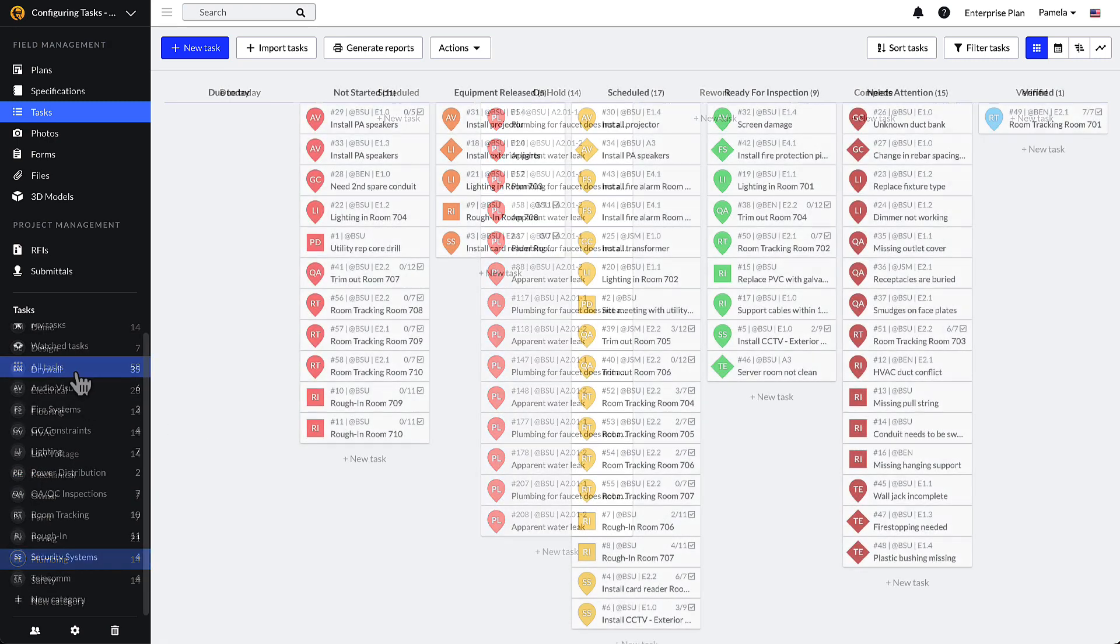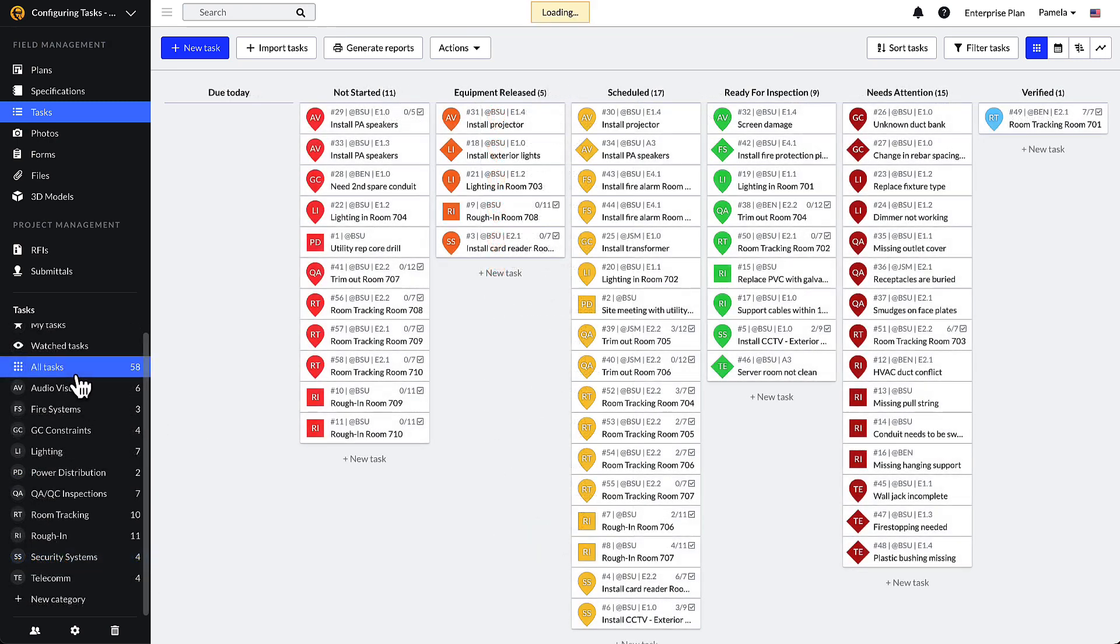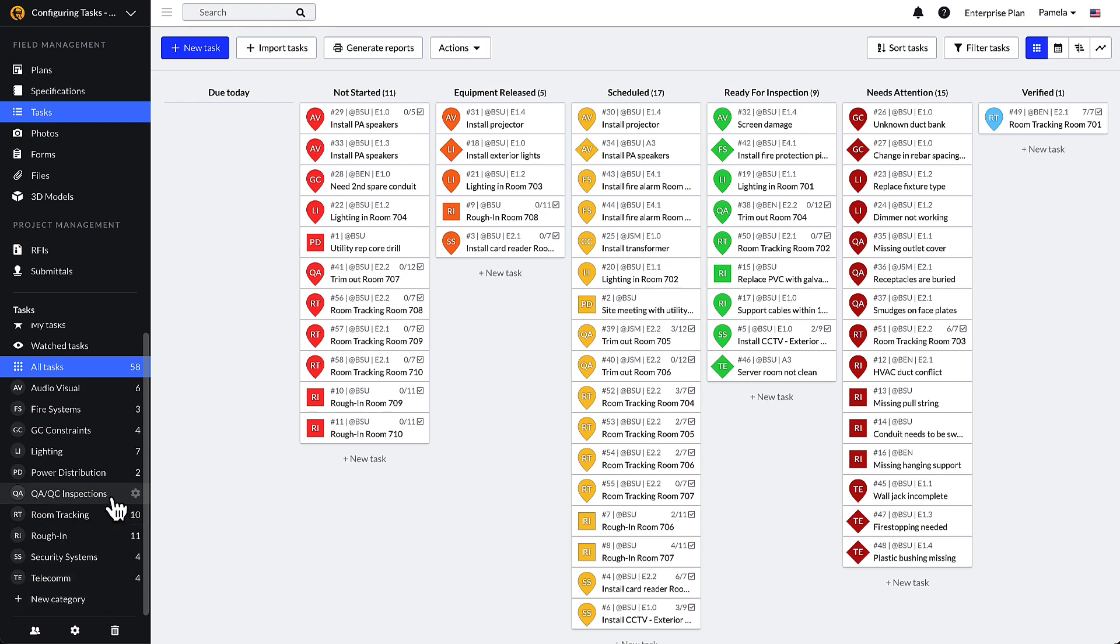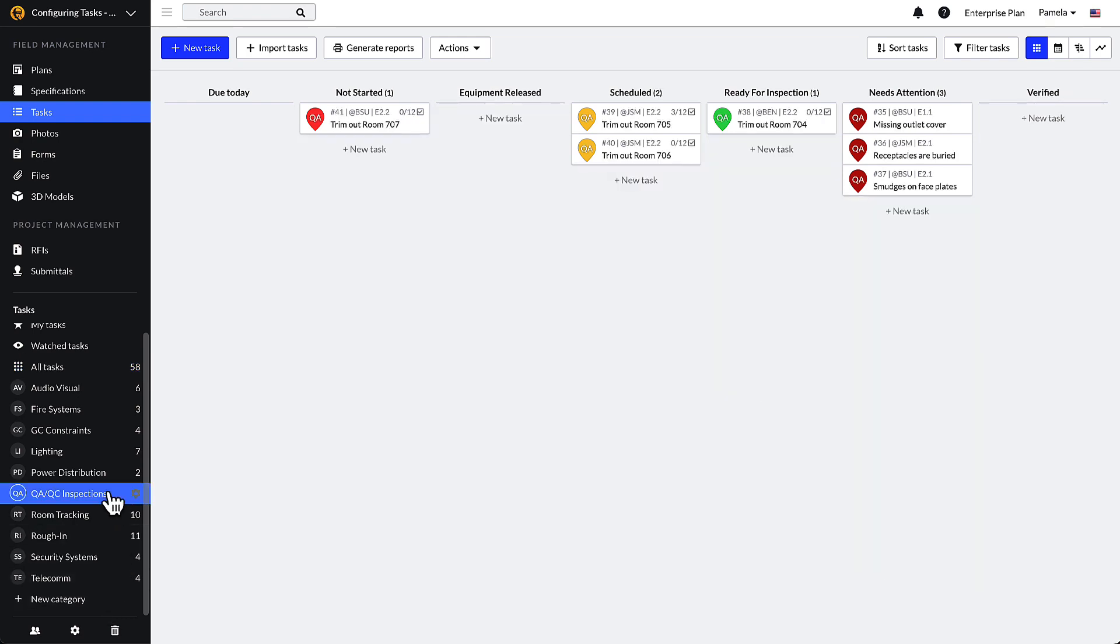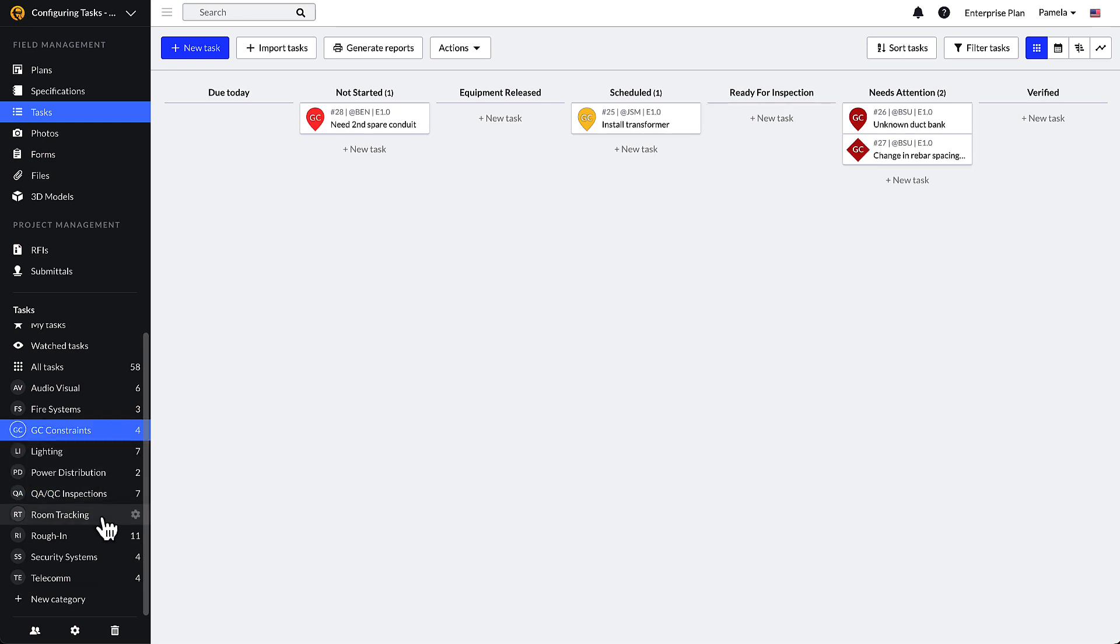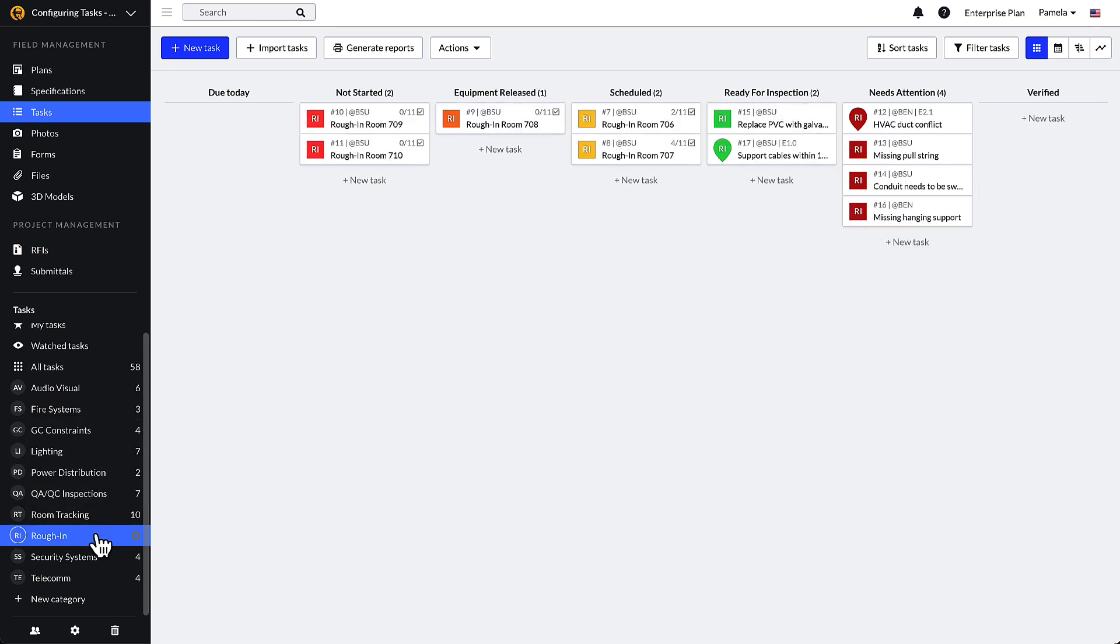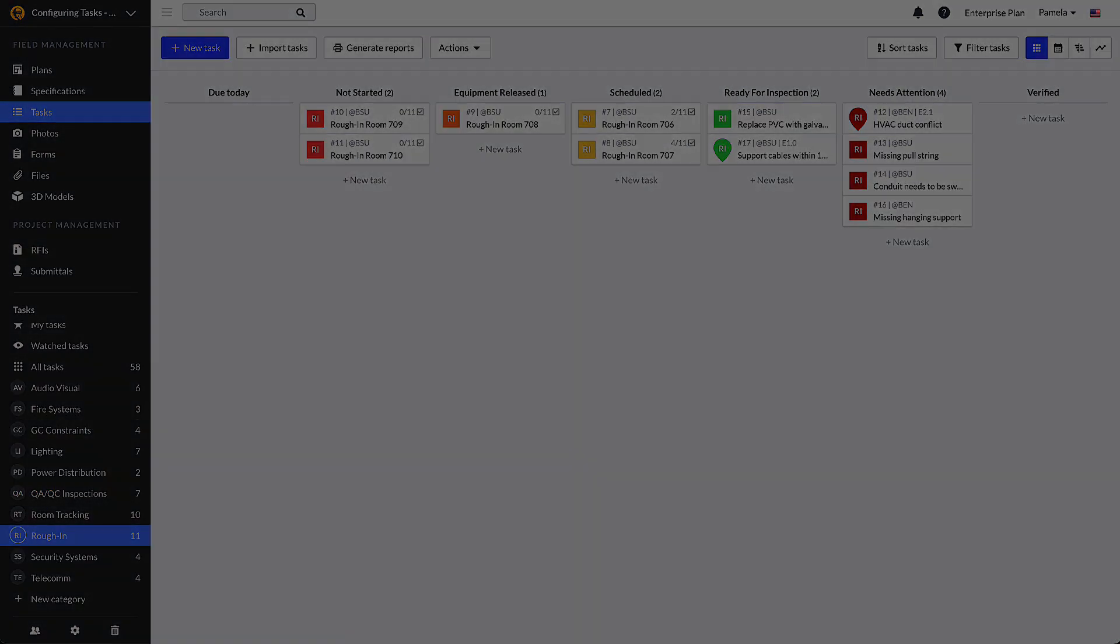For subcontractors, categories are often defined as the scopes of work that your team manages on a job site. Examples for an electrical subcontractor may include QA/QC inspections, GC constraints, and rough-in.